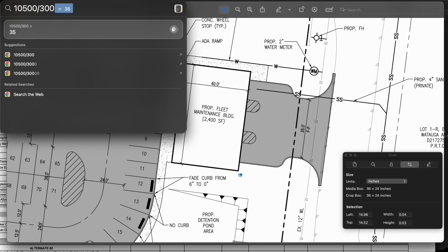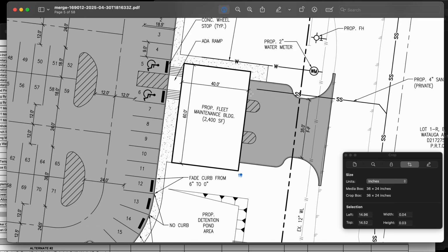The reason why it is more than the building itself, I think we were at 20, is because whenever you excavate the soil, it is loose. The soil is going to swell. It is not as compacted as whenever you put the select fill in and compact it, and you go 5 feet out, of course. There's just always going to be a loss once you compact it all down, right? And then, of course, the reason why I'm looking at 35 is because of the way that I like to look at this.